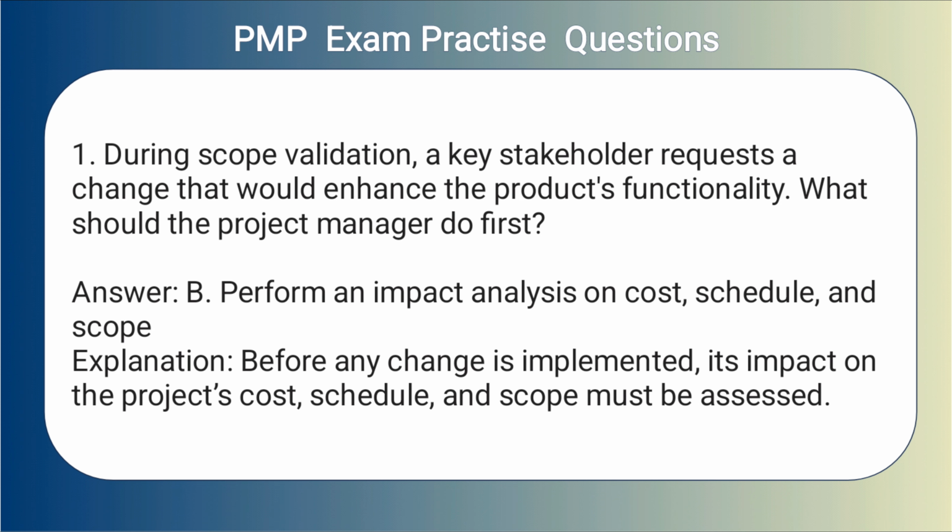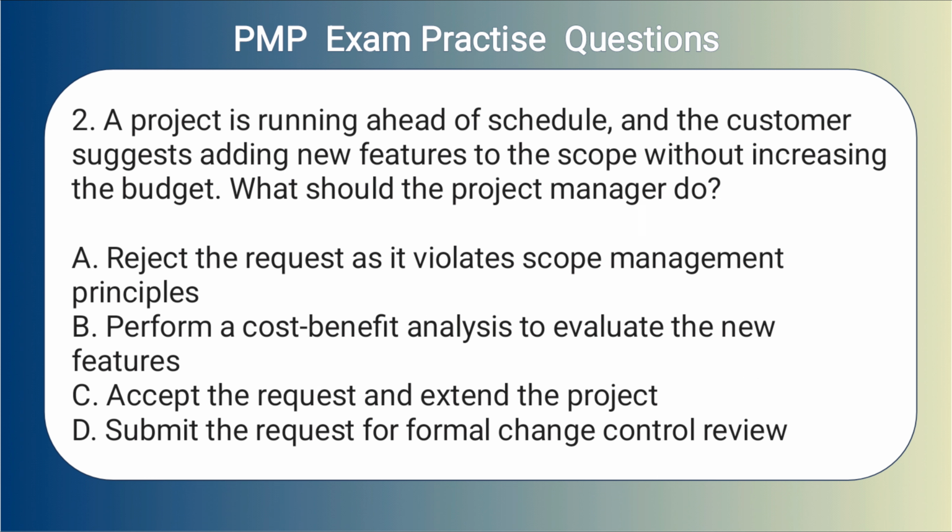Answer. B. Perform an impact analysis on cost, schedule, and scope. Explanation. Before any change is implemented, its impact on the project's cost, schedule, and scope must be assessed.